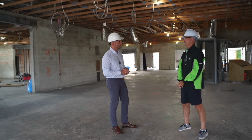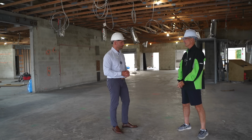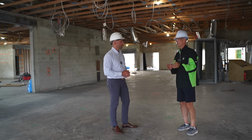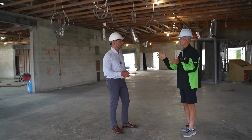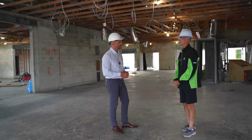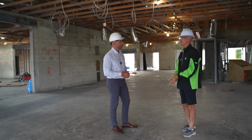Well, we're monitoring our electrical gear for October 10th. It's another milestone, right? Huge milestone for us. Long lead item, several months. We're checking that every week to make sure it's still coming on the promised date. If and when it does meet that date, we'll have 2 weeks to energize it because the room will be complete, it'll be dry. That puts us at November 1st with main electrical on for the building, and that means we can turn on the air conditioning systems. Excellent.